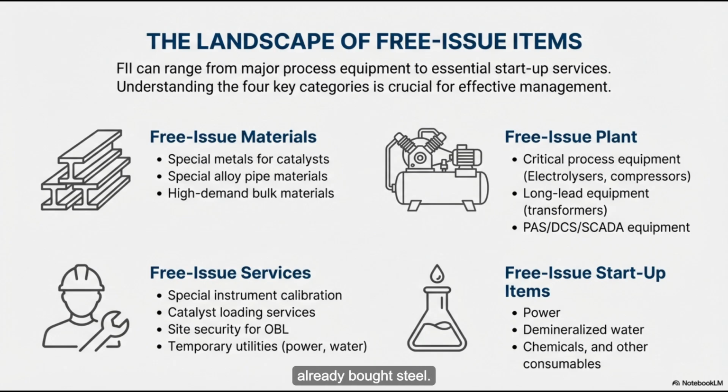Of course not. They've already bought steel. They've booked factory time. And the source notes that those cancellation costs can run up to 10% of the purchase price. So if a compressor package costs, say, $20 million, easily, you could be writing a check for $2 million just to walk away. That is money you have just set on fire. It's a sunk cost with zero return. It's buying the steak before you even know if you'll have a kitchen to cook it in.